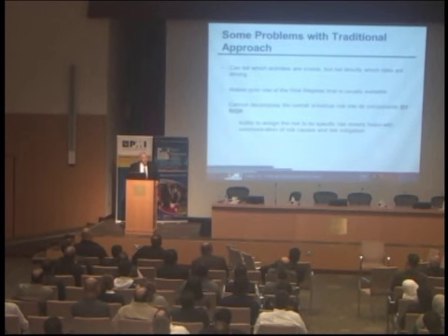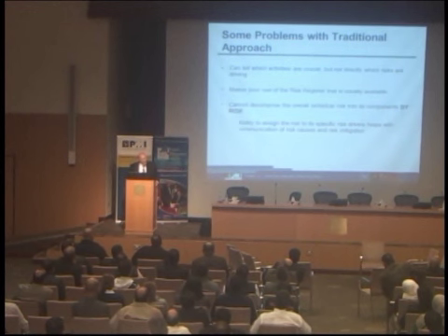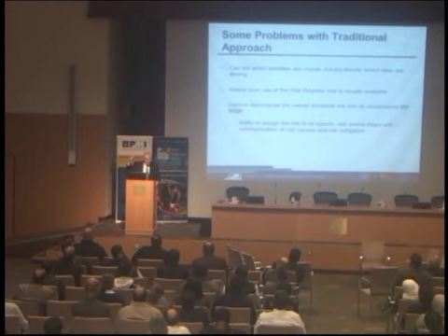Okay, but we do something called risk mitigation, and the idea is to find out which risks are important to mitigate, and sometimes you're surprised at that. The traditional approach makes poor use of the risk register that is usually available. The three-point estimate really doesn't use the risk register, and that was my complaint about the stuff I was writing about moving from qualitative to quantitative risk analysis.